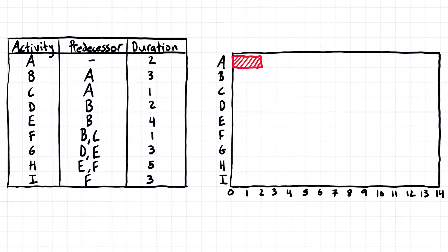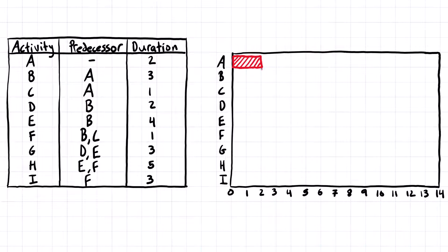Activity B depends on activity A, so it can't start until activity A has finished, and it's three days long. So we come to the Gantt chart, we find where activity A finishes, and that's going to be where activity B starts, and it is three days, so we'll come across three days.